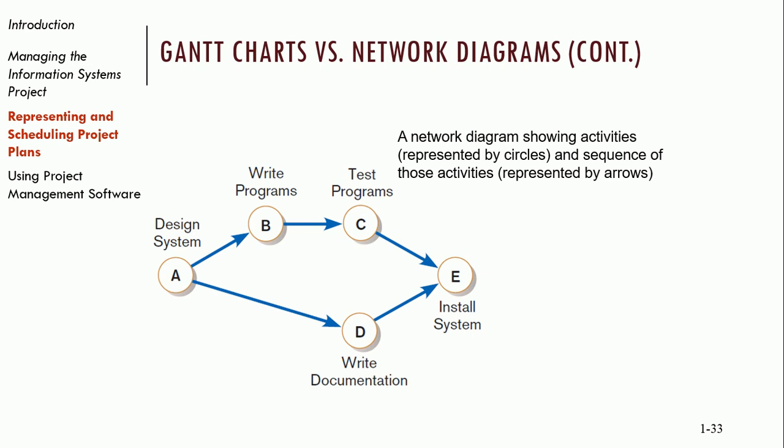Before I talk about the network diagram, there's one piece I didn't talk about yet — the work breakdown structure, or WBS. A WBS is a list of all your tasks. You break them down to whatever level of granularity is appropriate for the particular project, breaking down all those tasks.